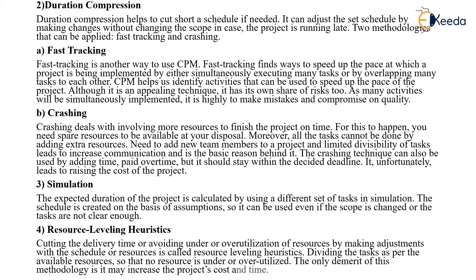Finally, we have Resource Leveling Heuristics, where cutting the delivery time or avoiding under or over utilization of resources by making adjustments with the schedule or resources is called resource leveling heuristics. It provides tasks as per the available resource so that no resource is under or over utilized. The only demerit of this methodology is it may increase the project's cost and duration.